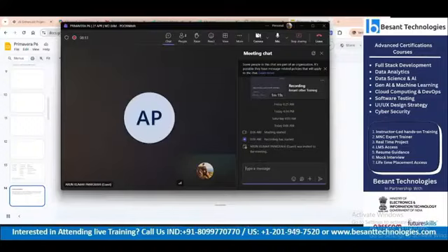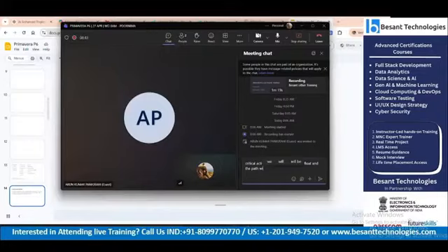As I said, in colloquial language, activities which cannot afford any further delay are considered critical activities. Technically, critical activities are activities with zero float, and the path which connects critical activities is called the critical path.